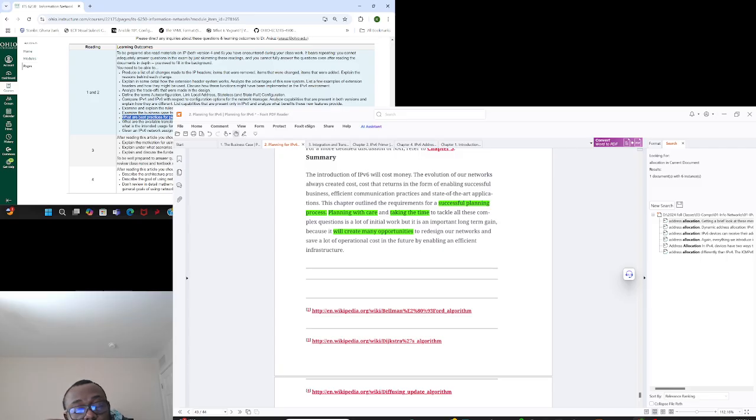So how do we approach that? To approach that, we suggest three types of ways. After you segregated them into your various domains, the first one will have to do the transition from the core towards the edge, which is very optimal because we expect that your core network would have matured in IPv6, especially your ISPs would have already been deployed in IPv6 because they are the ones to even give you the prefix in the first place.